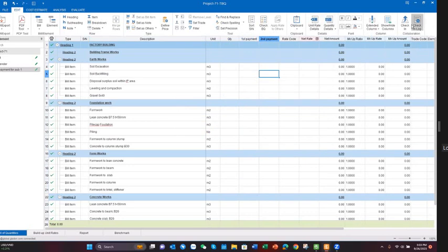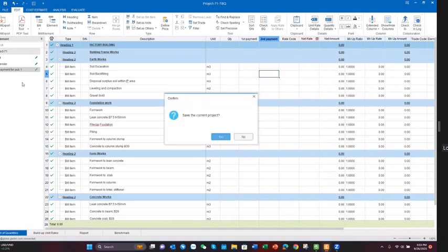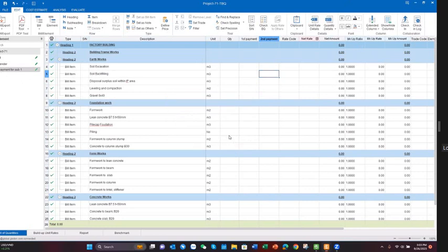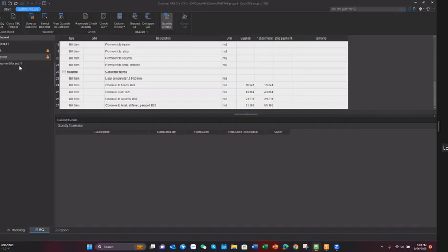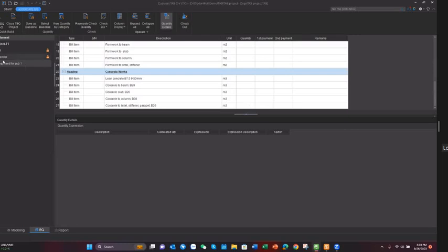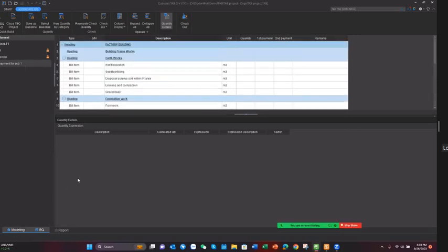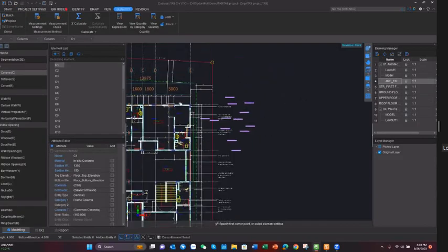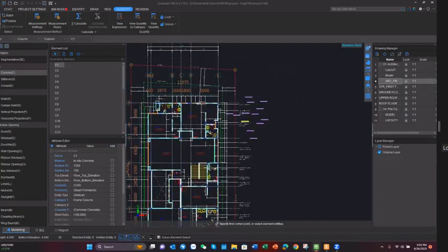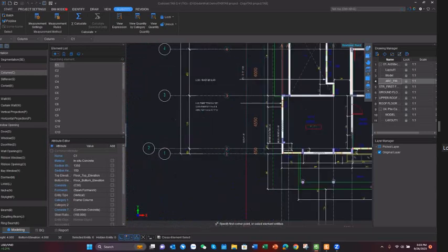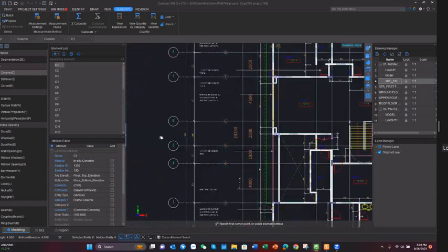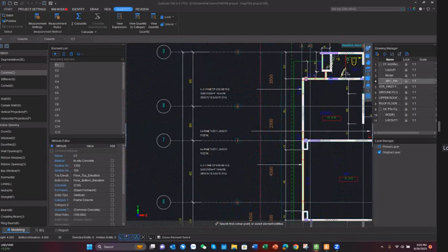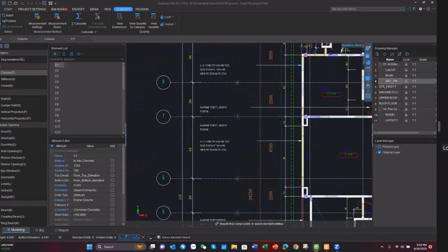So I will click checking to update the new bill to TIS and return with TIS, and we have the new bill here. And then, for example, return with the model. Okay, for example, in the first payment, we already finished from A61 to A66, and the second payment we finished 6 to 9, for example.